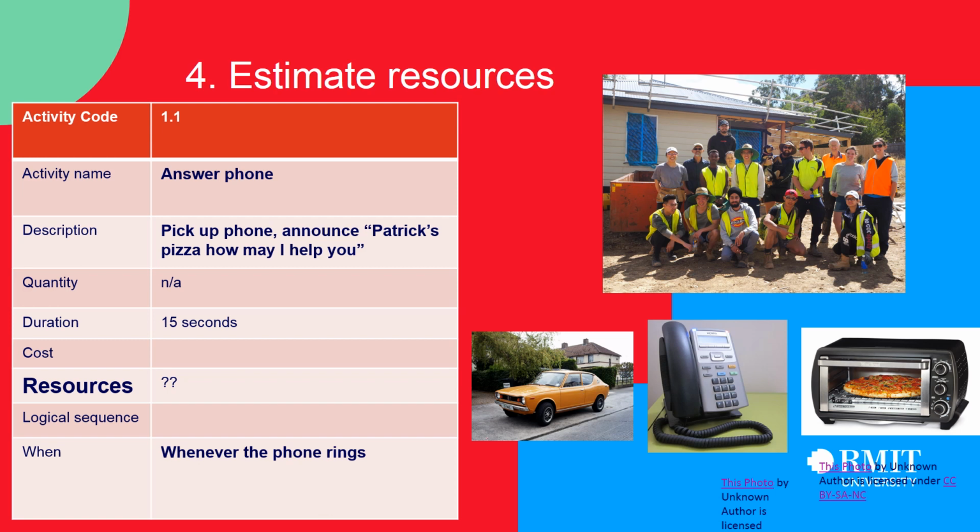When we add time to our program schedule, you'll be able to identify not only what resources you need, but also when you need them, and you can plan to have them there ready to use. For some activities, you may not need to allocate resources because the contractor doing that activity will bring the resources themselves. But for other activities, you will need to know in advance how many people, computers, cars, wheelbarrows, etc. you need to get the task done in that time. When we allocate resources, we call primary resources those that are available to you now. Secondary resources are those that are available in the future.